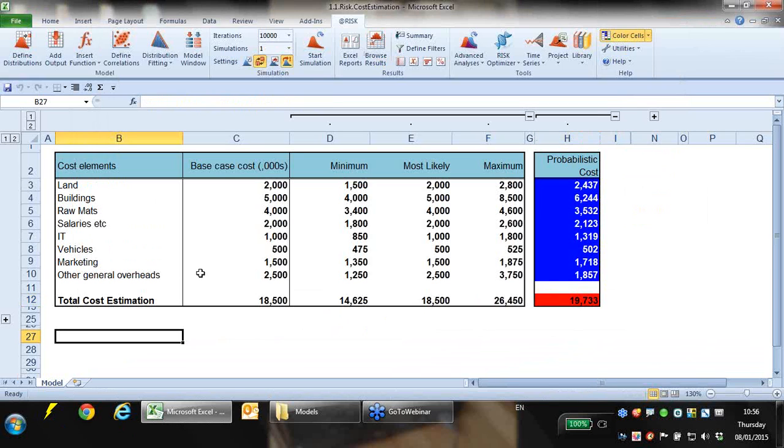Once we've done that analysis and found out what the key drivers are, a common thing is to want to know what happens in the event that those key factors spiral out of control or are at the high or low end of things. What does that mean for our overall model? One of the things we can do is something called a stress analysis, which is down here as one of the advanced analyses, but it should be one of the more common analyses.